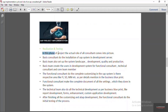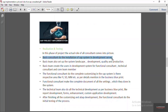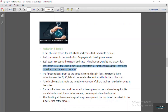In the realization and testing phase, the actual role of all the consultants comes into picture. It starts with the basis consultant. When you purchase the SAP software, the basis team first installs the SAP system on the development server. They also set up the system landscape, which generally consists of development, quality, and production. The basis team initially creates users in the development system for the functional consultants, technical consultants, and core team members who will be doing configuration, testing, and technical development.